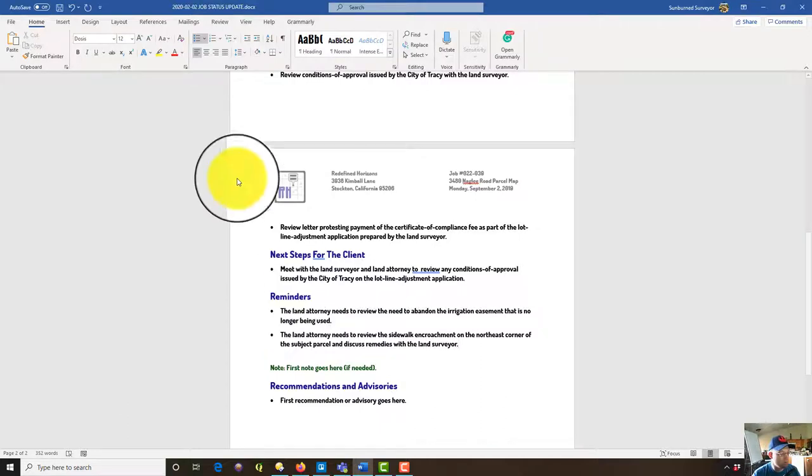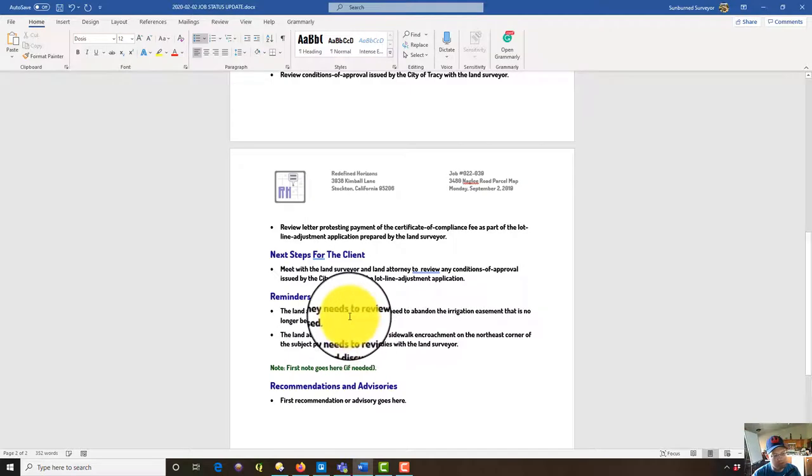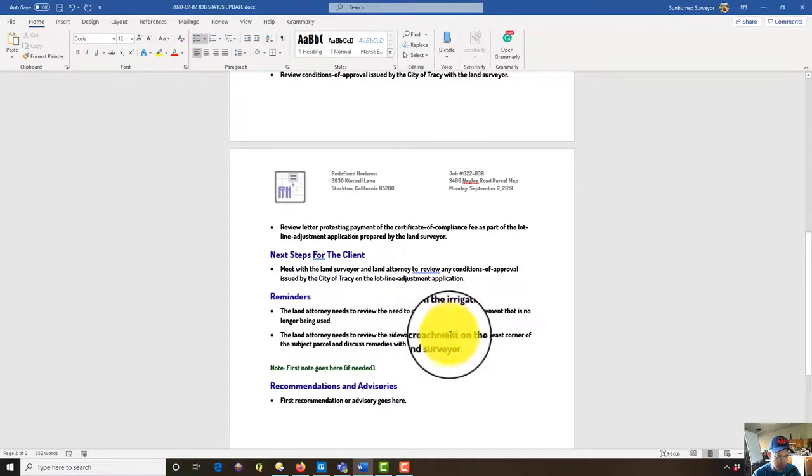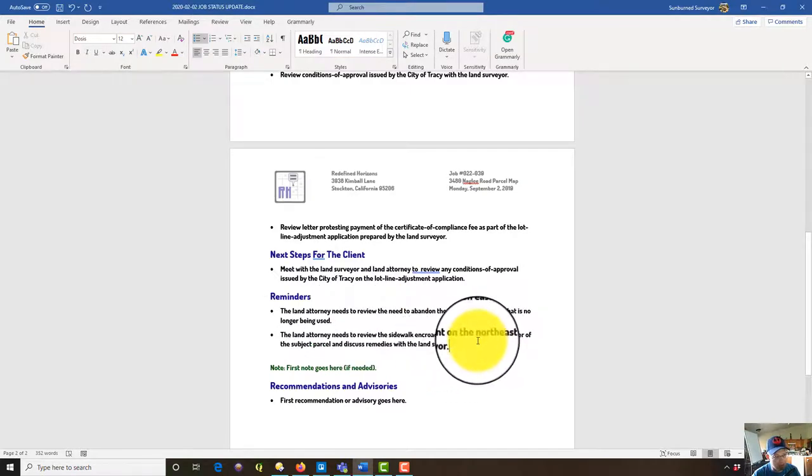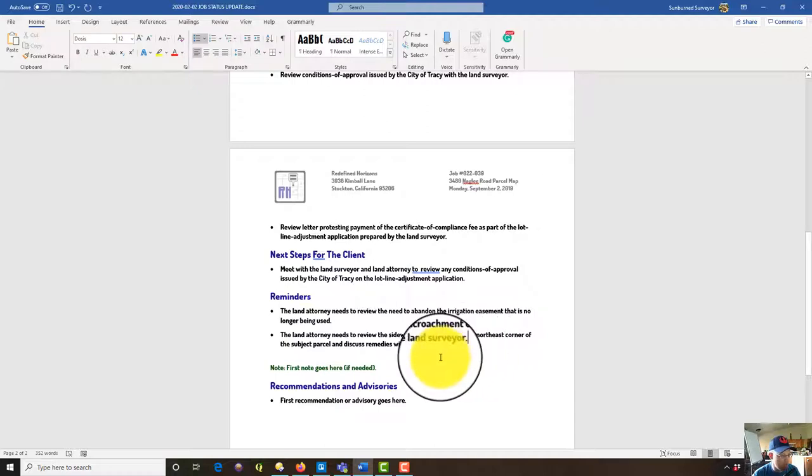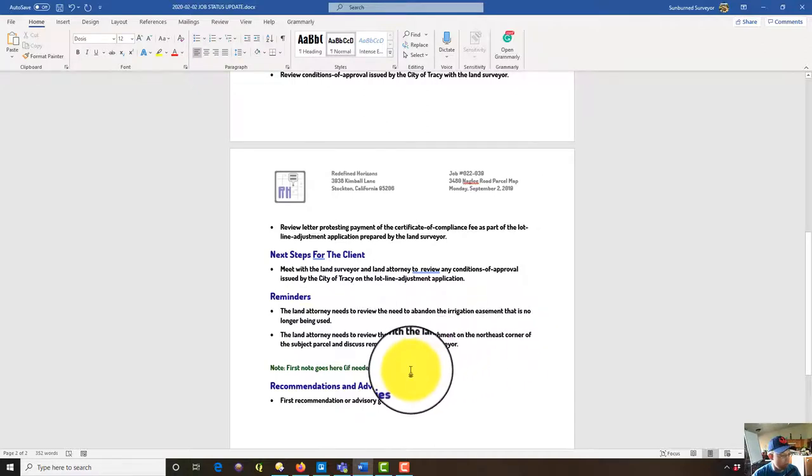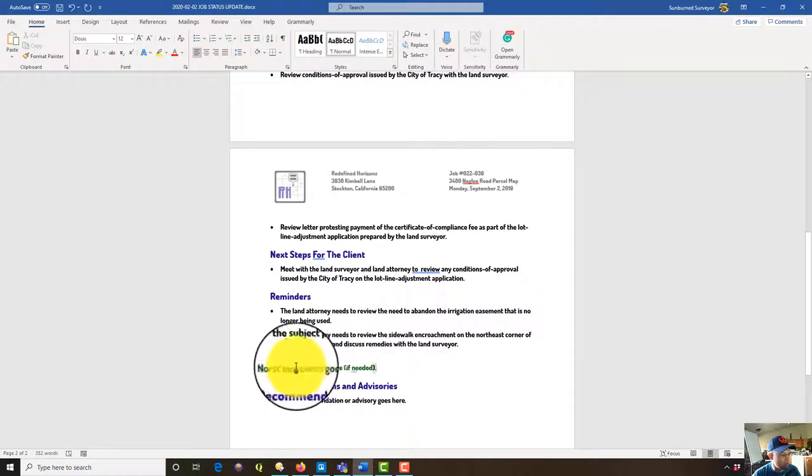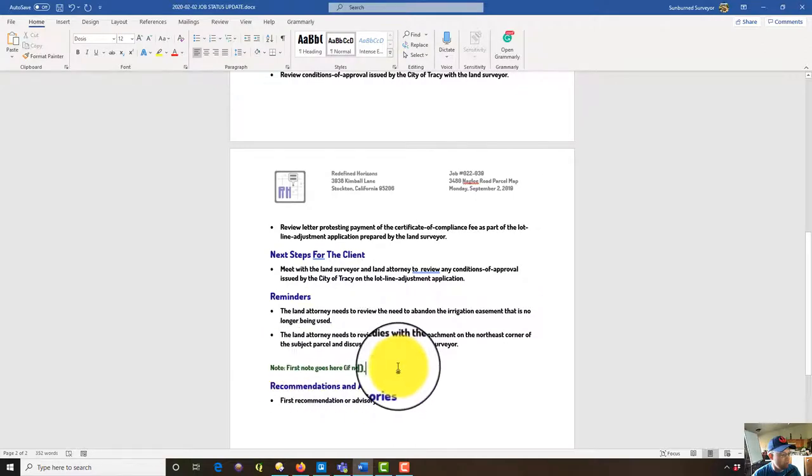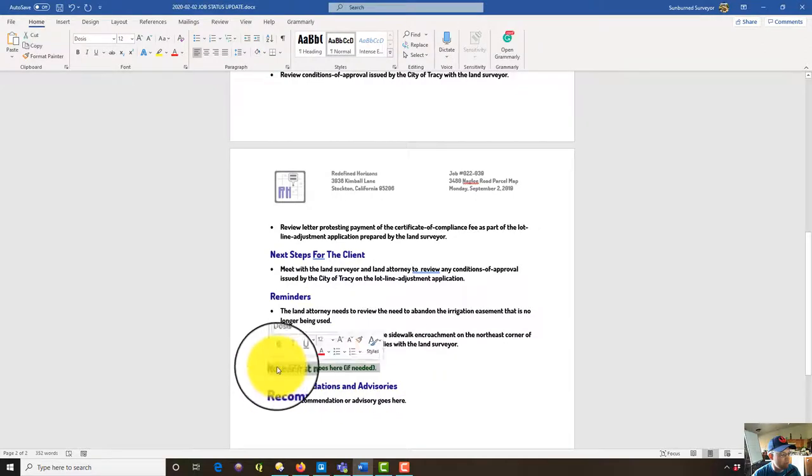So we've got an easement that we're no longer using. I've already told the attorney, I just want to remind him. And we've got a little sidewalk encroachment on the northeast corner of the parcel. At some point we've got to fix that. That ball is in the client's court and the attorney's court. I'm just giving him some friendly reminders.